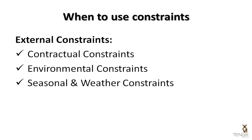Seasonal and weather constraints can also affect many projects. For example, it may be necessary to shut down certain construction projects during winter months due to freezing temperatures that make work impossible or too dangerous.